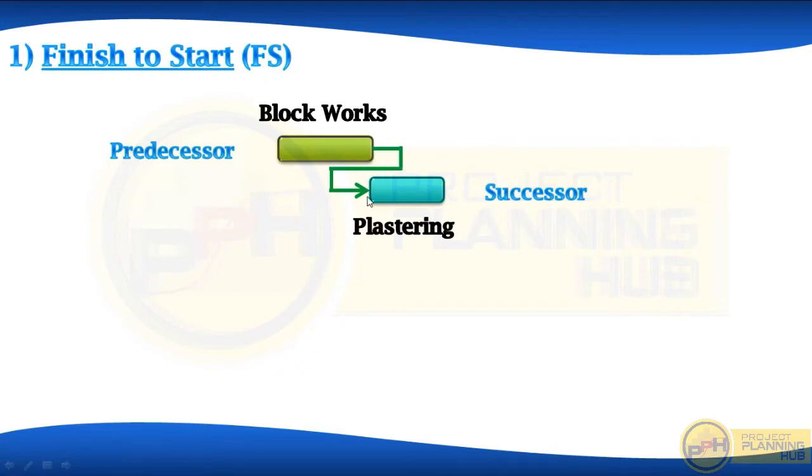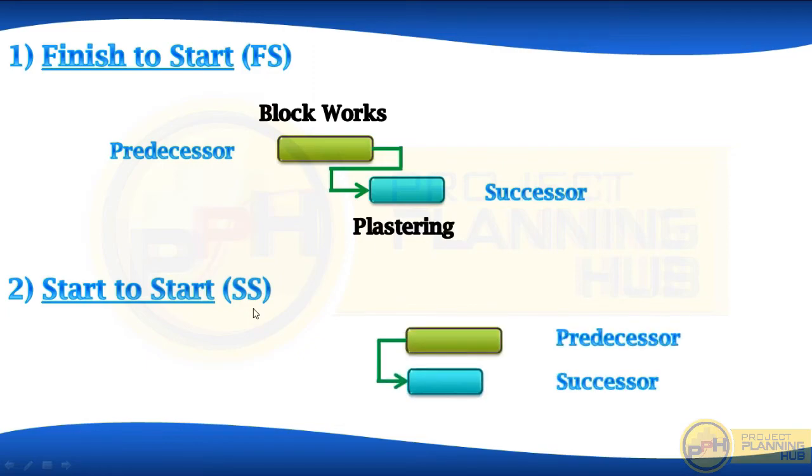Okay, next relation is start to start, SS. Here two activities will start at the same time. Their start point will be the same, but they may not finish at the same time.